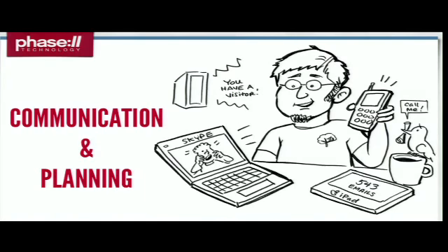And one last thing on the communication front. I talked a little bit earlier about stakeholders. Your communication is your way of reaching higher up in the organization to make sure you're not working with somebody that hasn't secured buy-in from their boss. Having that communication be able to reach upward inside of an organization is your pathway to making sure that you're working on the right project and that you're defining success criteria that are representative of the organization, not just the needs of that project owner. That's a really key piece of a communications plan.